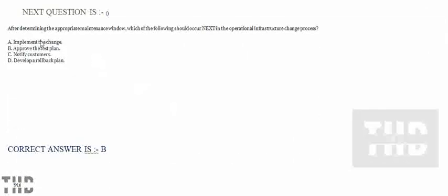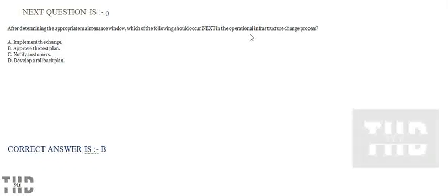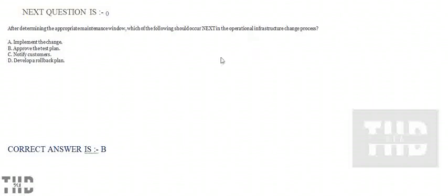After determining the approximate maintenance window, which of the following should occur next in the operational infrastructure change process? Option A: Implement the change. Option B: Approve the test plan. Option C: Notify customers. Option D: Develop a rollback plan. Option B is correct.